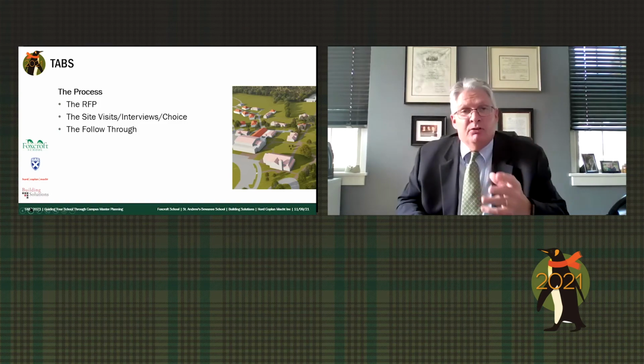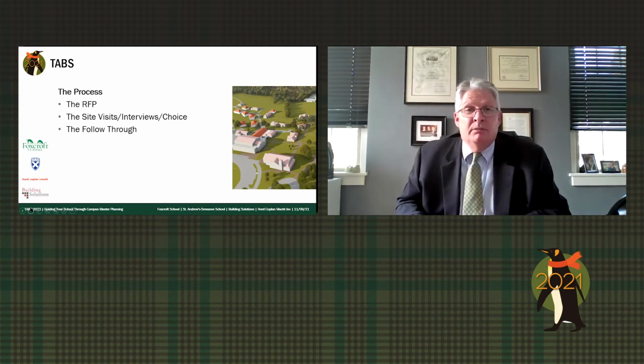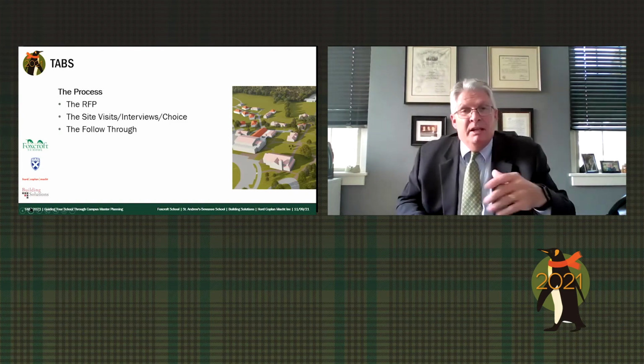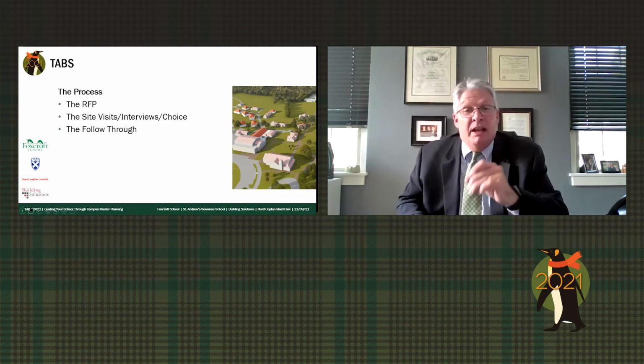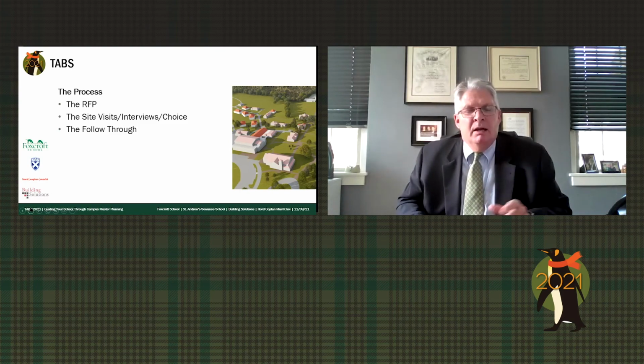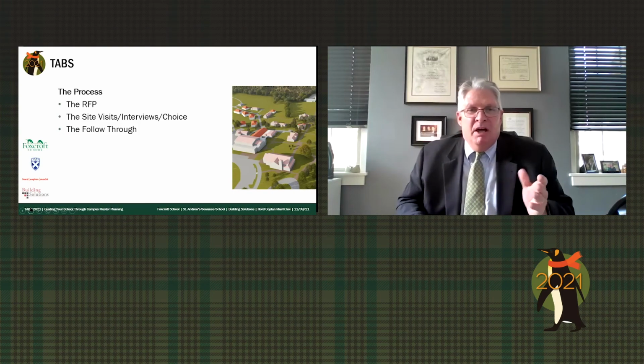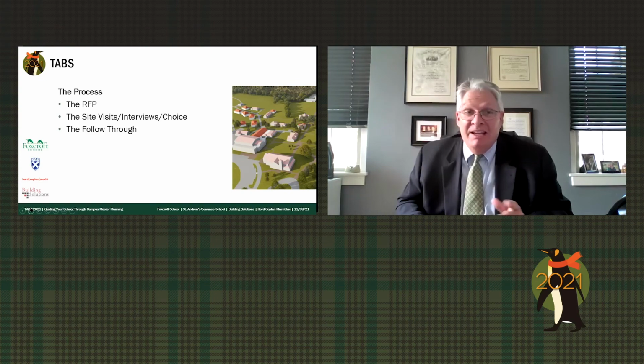And then they were able to score each of the firms, and they checked the credentials of the folks in those firms to make sure that the firms were actually committing the A team to work with us on the project, and that the A team they were committing was a group of individuals that had actually done some work together. So they were able to do some of that investigating to make sure that we were getting the best that firm had to offer. And the bottom line was we did end up with the A team from HCM. And of course, we got Peter Weinbrenner, which we knew at that point that we got the rock star, and so we were thrilled with that process.